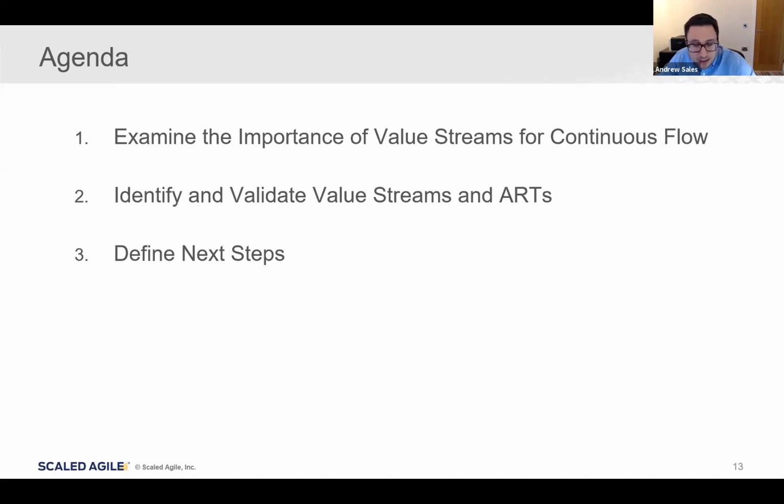One other thing I really like to do at this point is put a risk sheet up in the room. This really allows the attendees to post risks or concerns they may have during the event itself, which then the facilitators can address from time to time as you would do through a PI planning event.